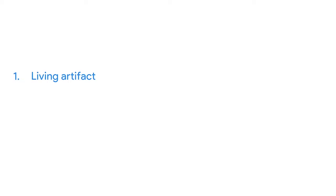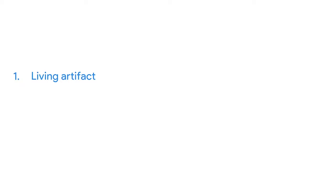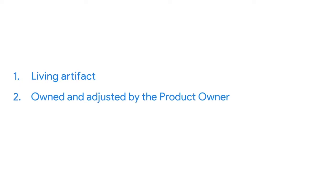There are three key features of a Product Backlog. First, the Product Backlog is a living artifact, meaning that items are added to the backlog at any time. The Product Backlog evolves throughout the whole lifecycle of the project and serves as a central guide for the team to know what to work on next. Second, the Product Backlog is owned and adjusted by the Product Owner. And finally, the Product Backlog is always a prioritized list of features. When there's new information or new features, those are added to the backlog in order of importance.